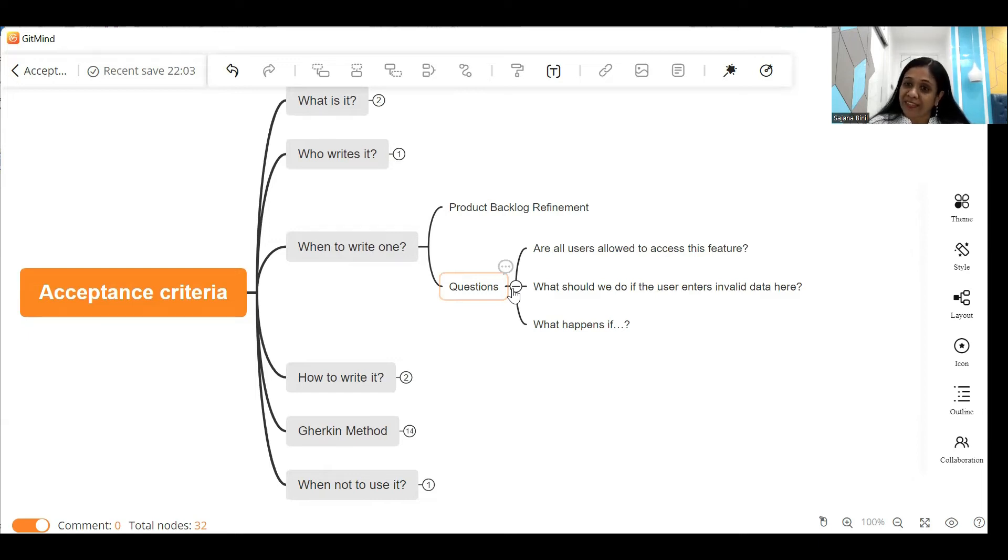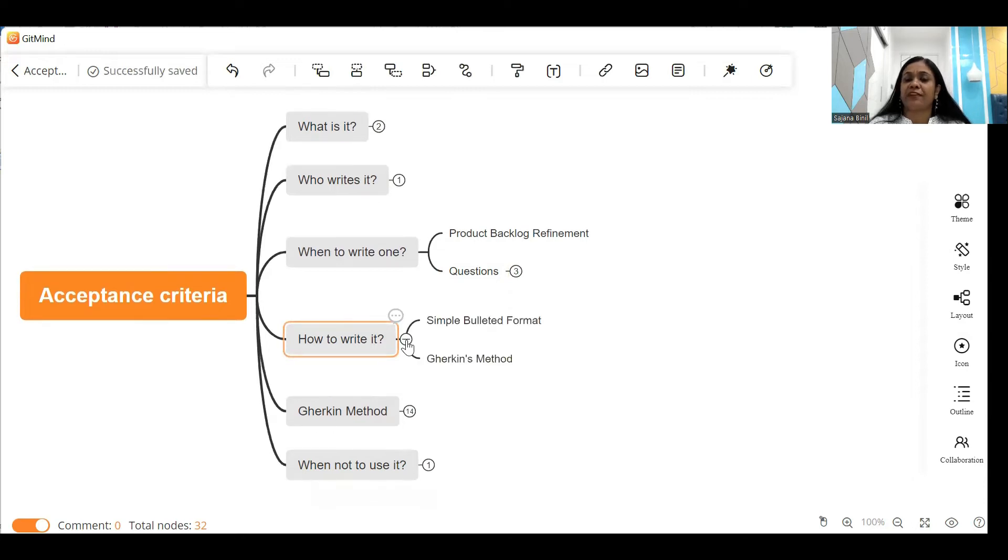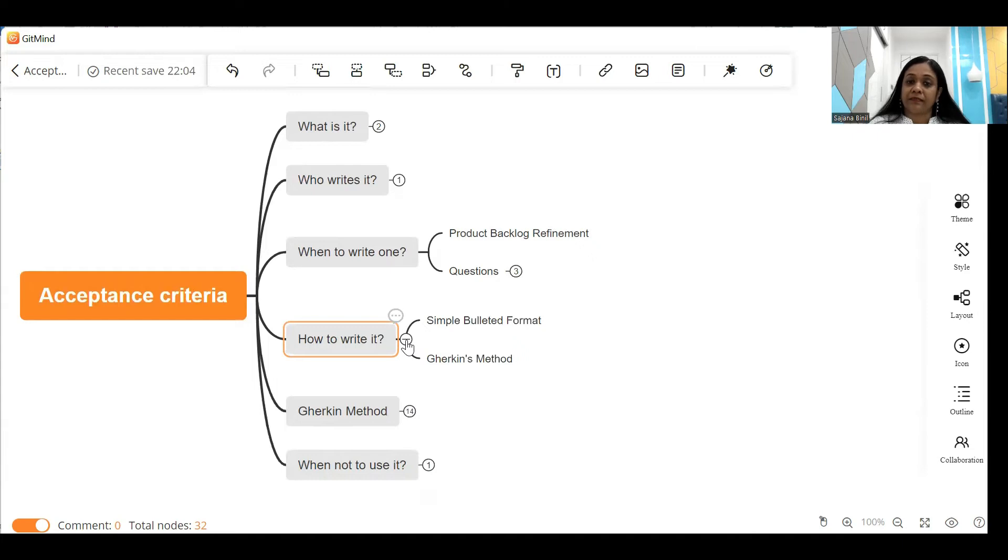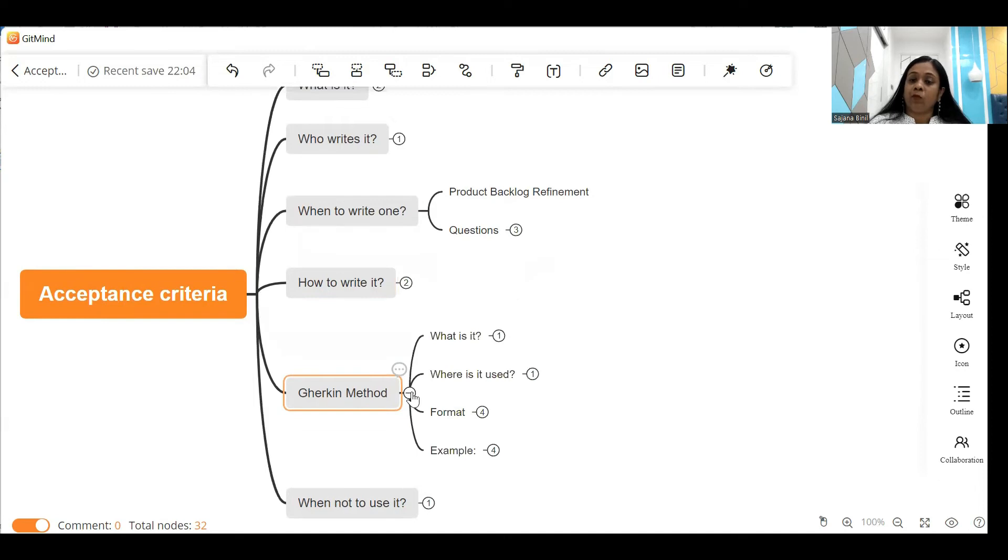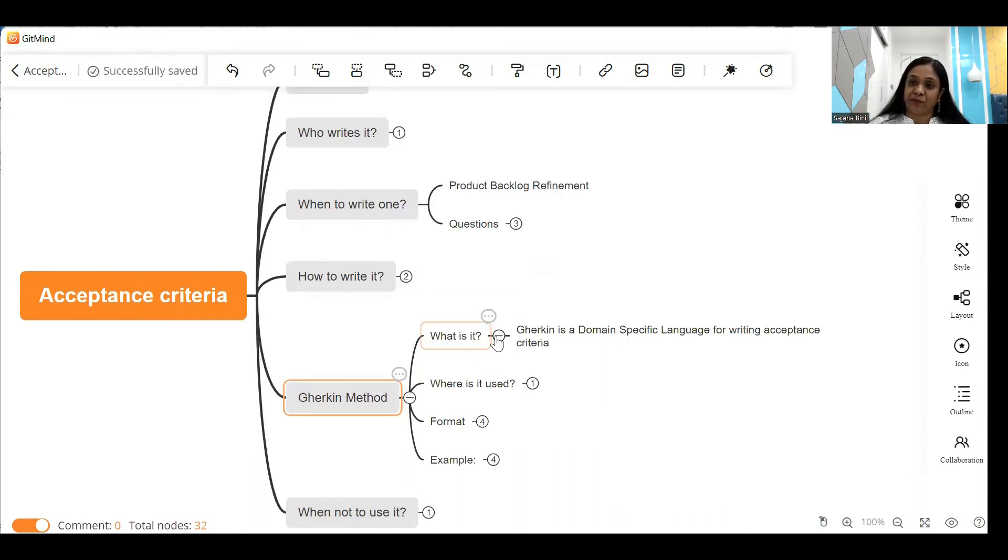Fourth point: how to write an acceptance criteria? Well, acceptance criteria can be written in a very simple format as a bulleted list. You can also write acceptance criteria using the Gherkin method, and today's video we are going to emphasize on the Gherkin method. What is the Gherkin method? Now Gherkin is a domain specific language used for writing acceptance criteria.